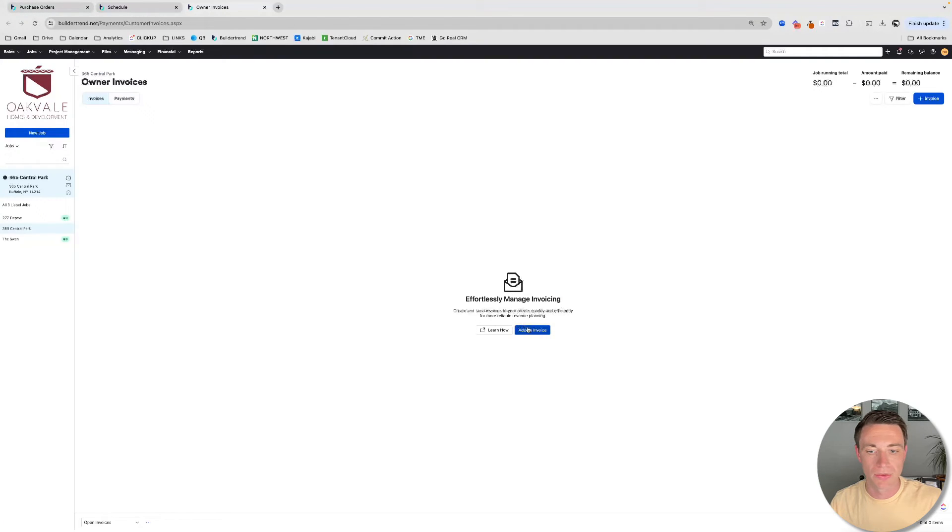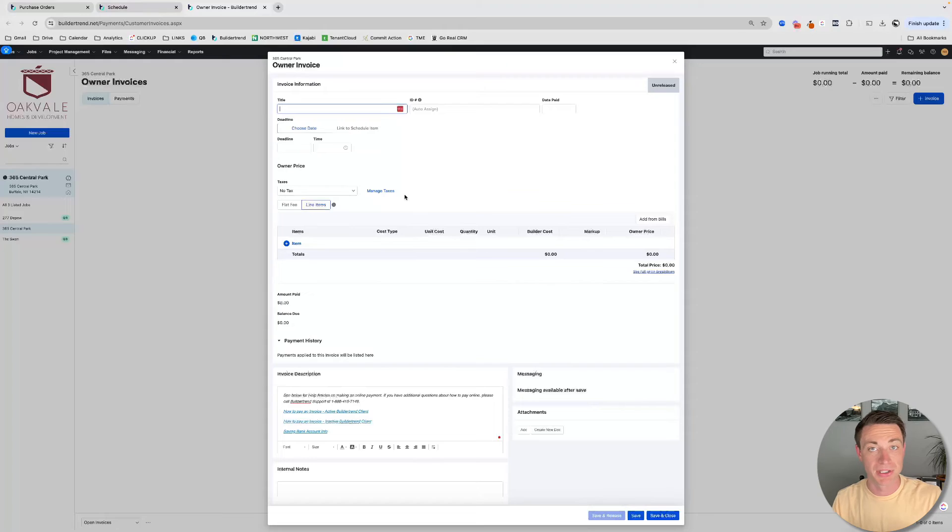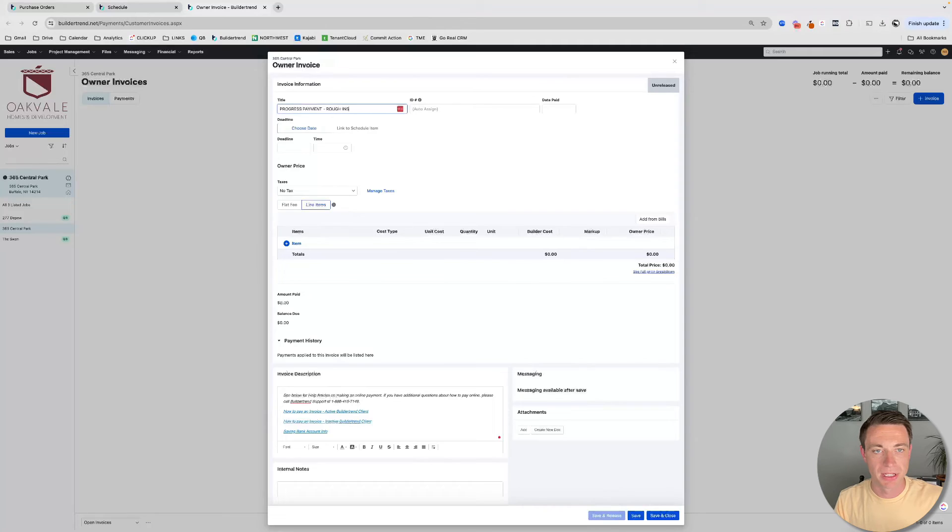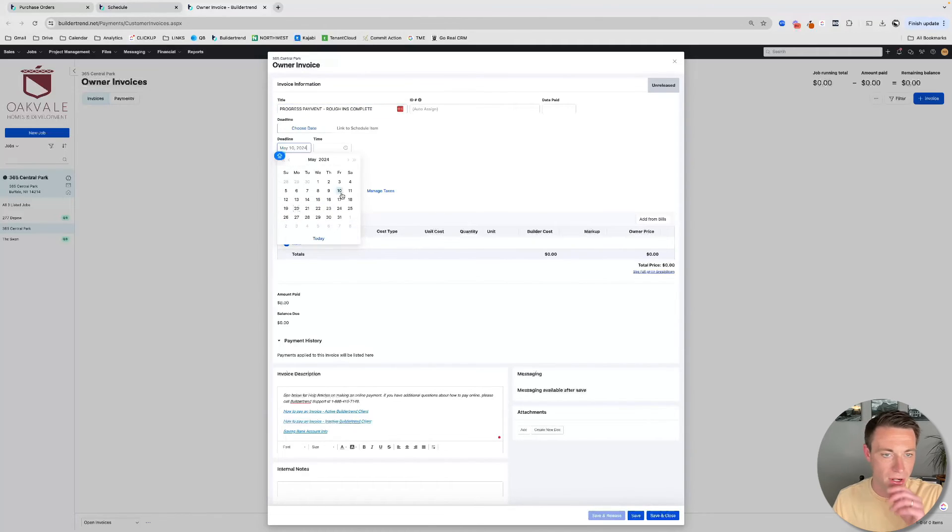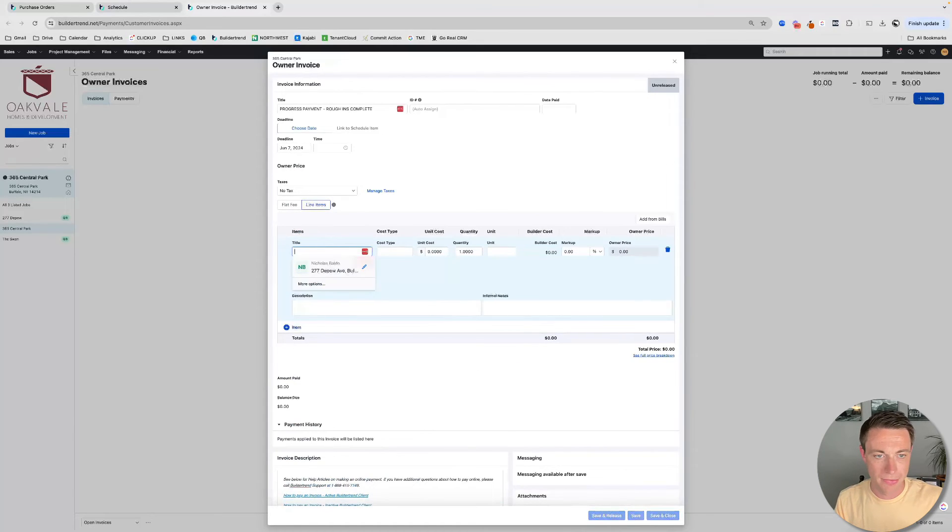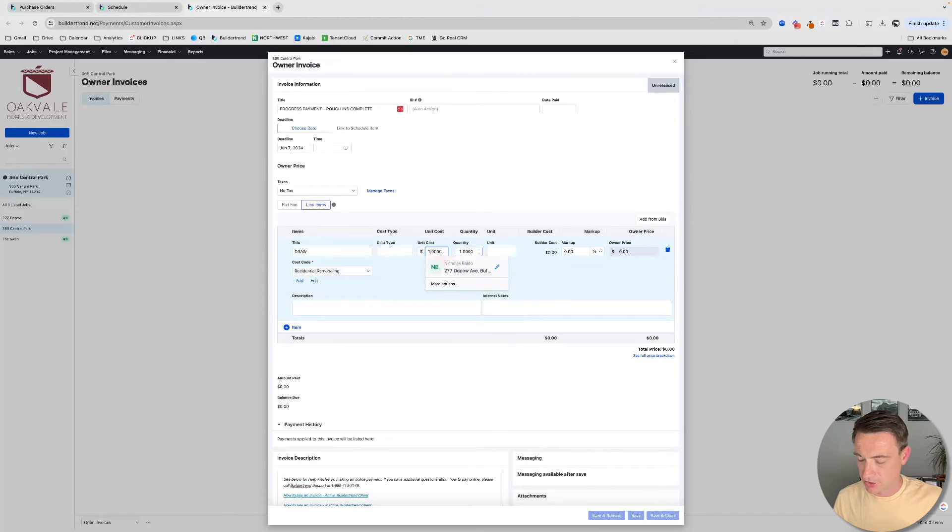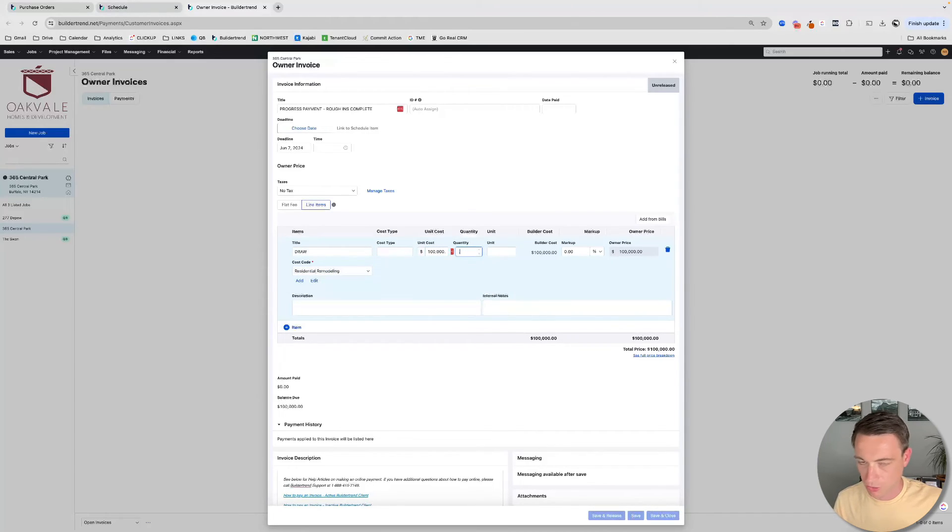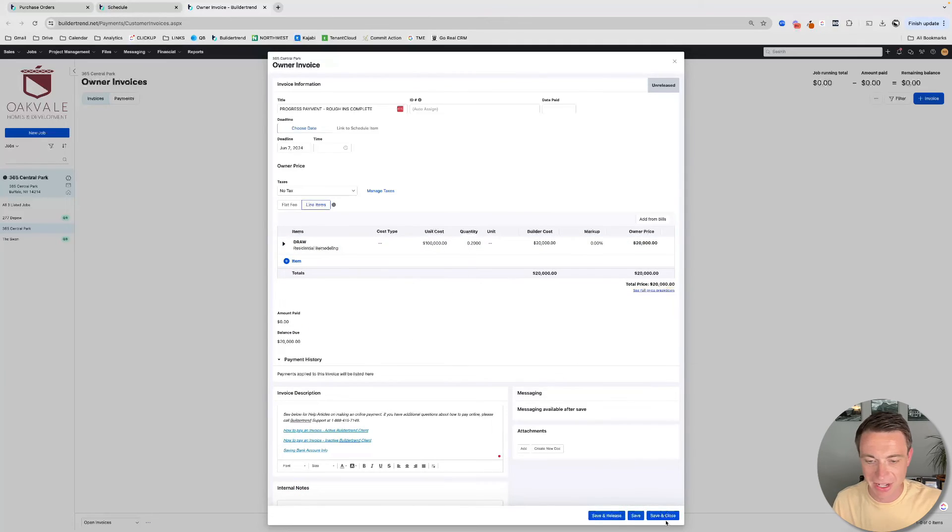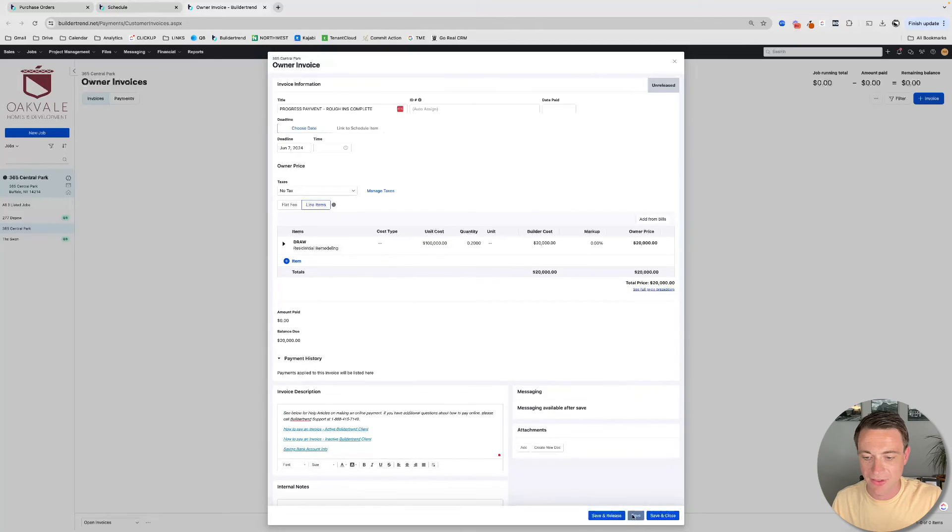So you could just set up an invoice and say, you know, like, rough-ins are complete. Invoicing is really good for progress. So progress payment, rough-ins complete. And again, I can kind of know about this date, rough-ins are going to be complete. This is kind of a draw. And it can be like your total project is $100,000. And we're going to do 20% of that, whatever. You're going to get into invoicing, all that stuff. Don't worry, I just want to show you the dates here. So here I'm just based on a deadline. Let me just save that.